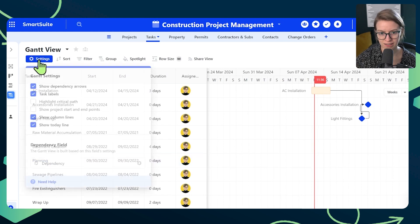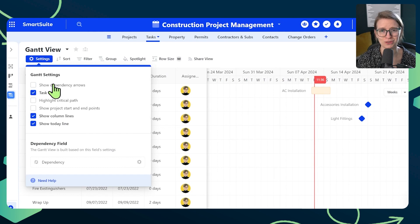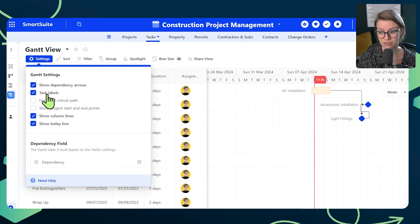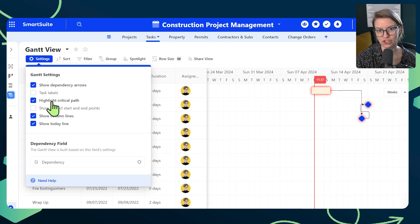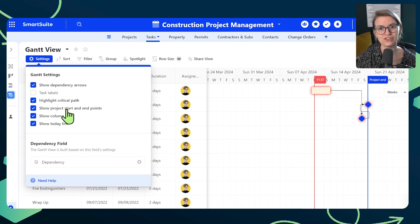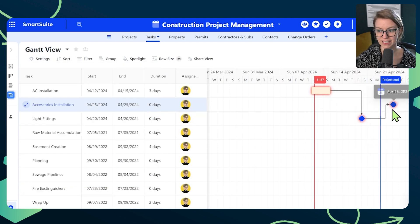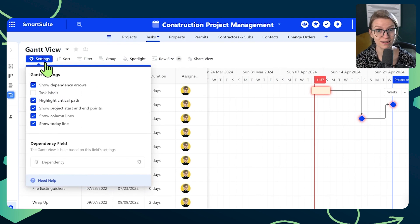Over here in the settings field, we can actually adjust what this Gantt chart looks like. We can hide those arrows, hide the task labels, and highlight the preferred path of action — also known as the critical path. This feature is really helpful if you have a bunch of different tasks all at once and you're trying to figure out which are the most important to unblock other things down the line. Critical path is built right in. We also have a box that allows us to show the start and end dates of a project, so if something gets delayed, we can automatically adjust that project end date so stakeholders can easily understand whether we're ahead or behind schedule.